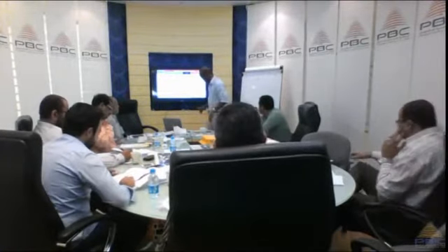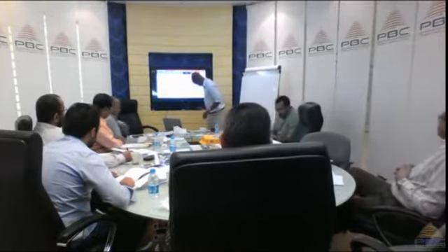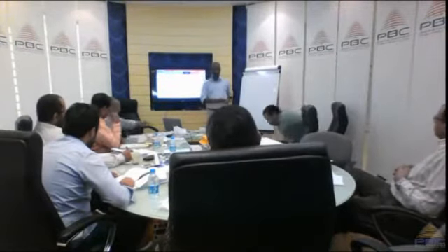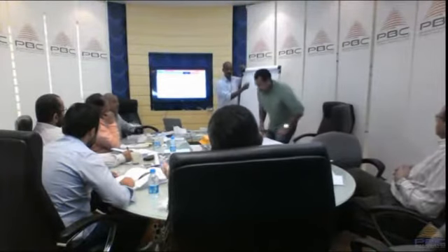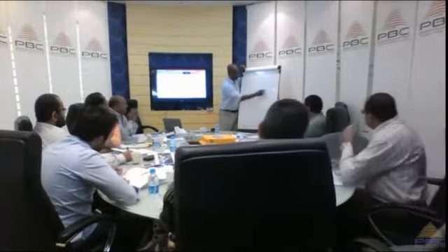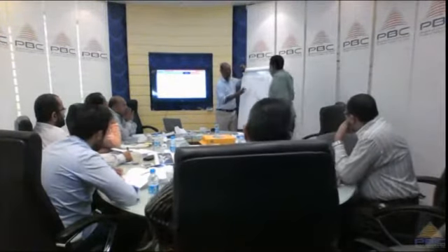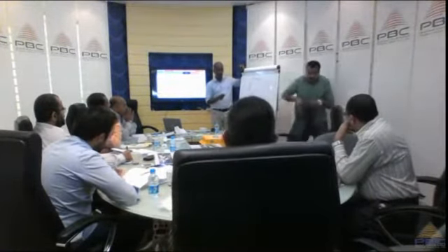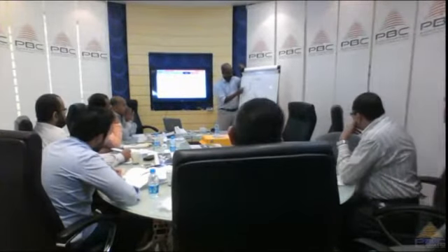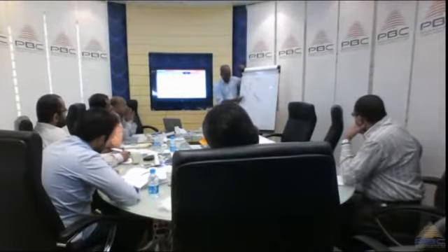What's the aim of any control process? In general, regardless of its scope or schedule or quality, the term control in project management means what? To be sure of the effectiveness of the plan. Things working according to budget and plan and cost. Exactly. So we have planned and we have actual. Okay. And what do we call this difference? Deviation, right? Deviation, or another term we use, more scientific, variation or variance.